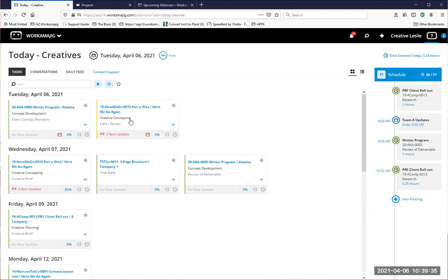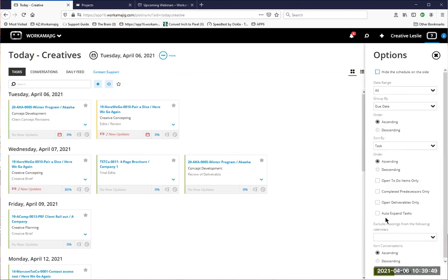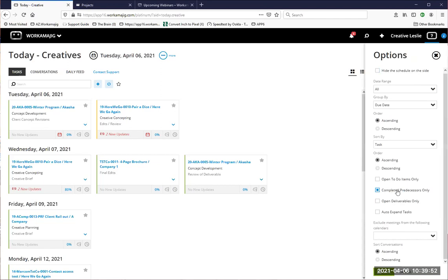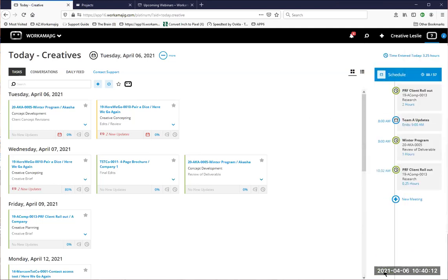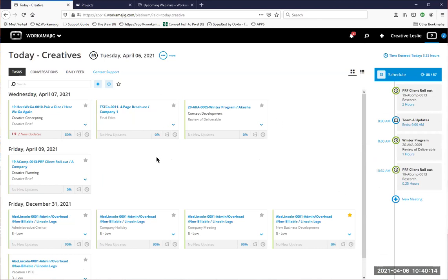I can't do a review. Here's another review, waiting on some things. So the idea is we're not ready to start it, so we can let it disappear. Get it out of your way. And that's why we really want you to understand why this completed predecessor option could be very helpful. If somebody wants you to start on it regardless, that would be a conversation you can hold, and then you can go and start on it. There's nothing preventing you from starting on it unless you have rules in your system that don't let you start it. So I'm going to hide mine, keep it simple today, and let's go on to other tasks at hand.